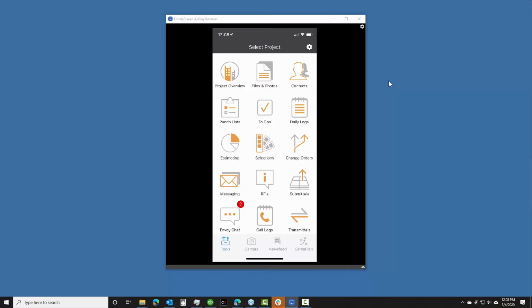But if you can go back and pull a project log report from that day, see what was happening in the field, look at photographs and documentation, know who was clocked in for a particular job site, now you start to have the information you need for things that might be happening yesterday, but might be a couple of years away from it.